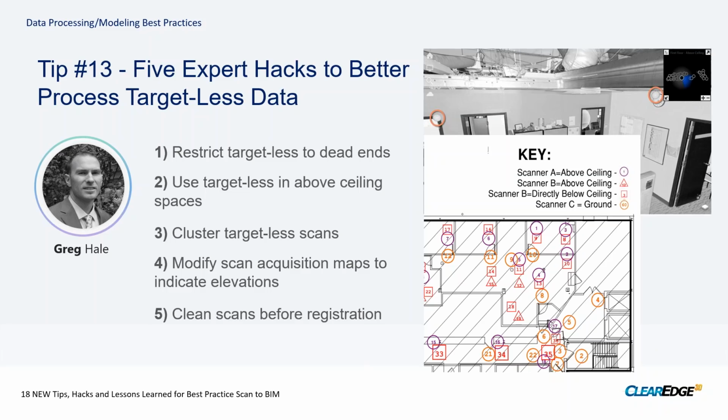You know, this one might be on the ground, this one might be above a desk, this one might be right into the ceiling space, like at the ceiling level, and then whatever's above. And occasionally in the very large ceiling spaces, we might have some additional notes in there for higher above ceiling scans. And this really also helps not only us in processing the data and then creating 3D models from it, but when we do a handover to the client, they can go back and reference a simple PDF with even potentially a link to the 360 picture exactly where that scan is at.